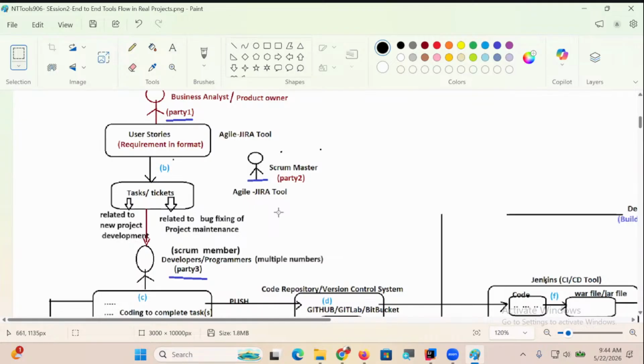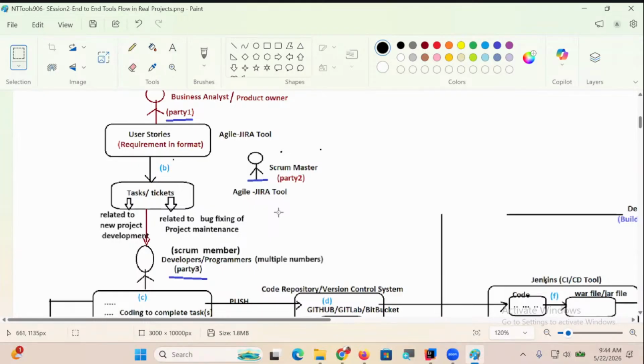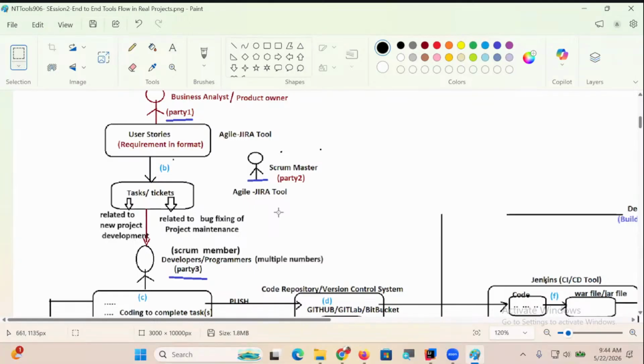It's not like that. Task is given for one week, and in that week they don't touch it. Every day they'll ask the status of the task. Because if a problem is there, you have to tell in the initial days only. You waited for six days and on the seventh day you said, oh, so many problems, I cannot complete. It's not going to work out. That's why every day one stand-up call will be there. You must attend that stand-up call, and it will always be conducted based on the Jira tool.